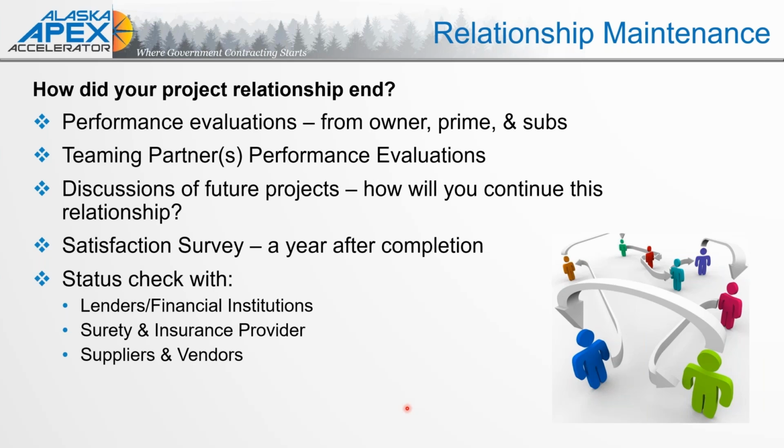We talked about, yes, the federal government has to provide those performance evaluations. That information, if you hit the right threshold, should be entered into CPARS. But how did you do? Getting that information, so even if you had a contract that was completed and it was under the dollar threshold, so it doesn't require a formal performance evaluation to be entered into CPARS, you can still request a written evaluation for performance from the contracting officer.